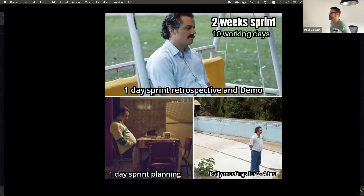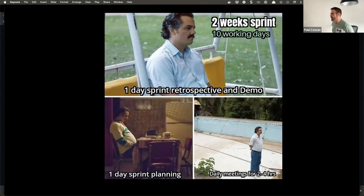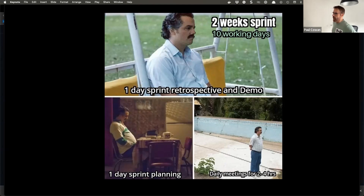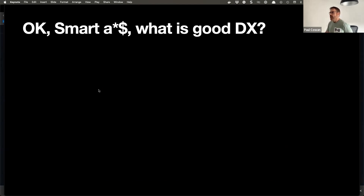People start gaming the system. On projects I've worked on, project managers were incentivized to move Jira tickets across the board regardless of what was happening with the software. Any smart PM will start taking fewer tasks into a sprint, and any good developer will start padding their estimates so they're not behind every sprint. I've really seen this go wrong — not entirely Scrum's fault, but more the way it's practiced.